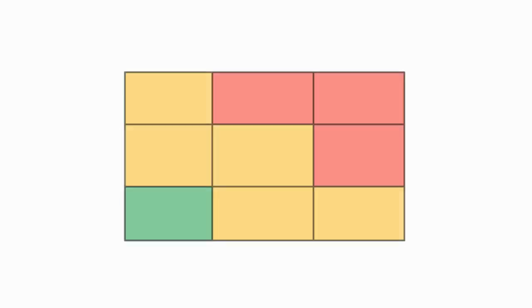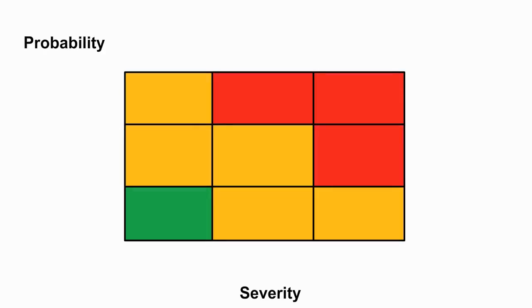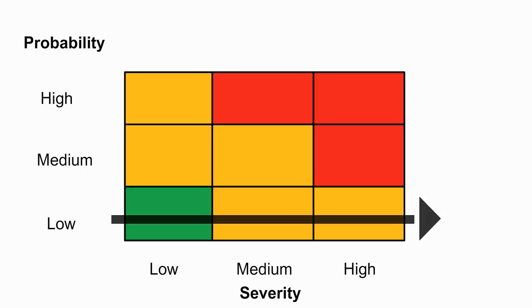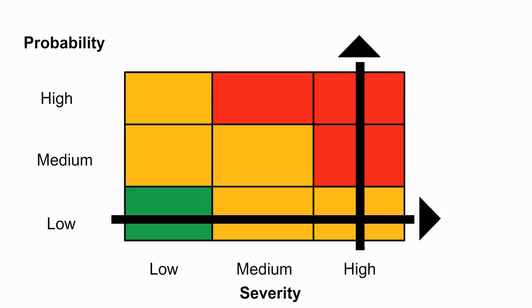The second point you need to understand is the risk matrix. It's a tool designed to help you calculate the risk formula easily. It is basically a table where the chance that the risk will happen is indicated on one axis and the severity of the event is found on the other. The cells of the table represent the score of the risk, which you can define in many different ways. There are many different shapes of risk matrices, as discussed in the project book.